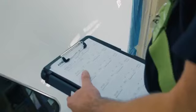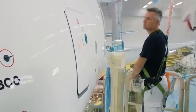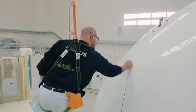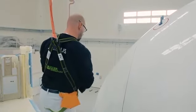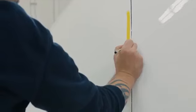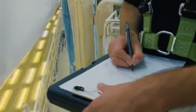During the final check or also during the customer inspection, if we find something, we will write a so-called Form A, a snag sheet. So we will document what we have found, what we have done, and the inspector will stamp that it has been done. This is just for internal documentation. And if it's something bigger that has to be done at a later stage, which we cannot manage during the customer check, then the customer will write a QLB, and then we will provide a rework according to the QLB or provide a statement saying that it is within the limits.